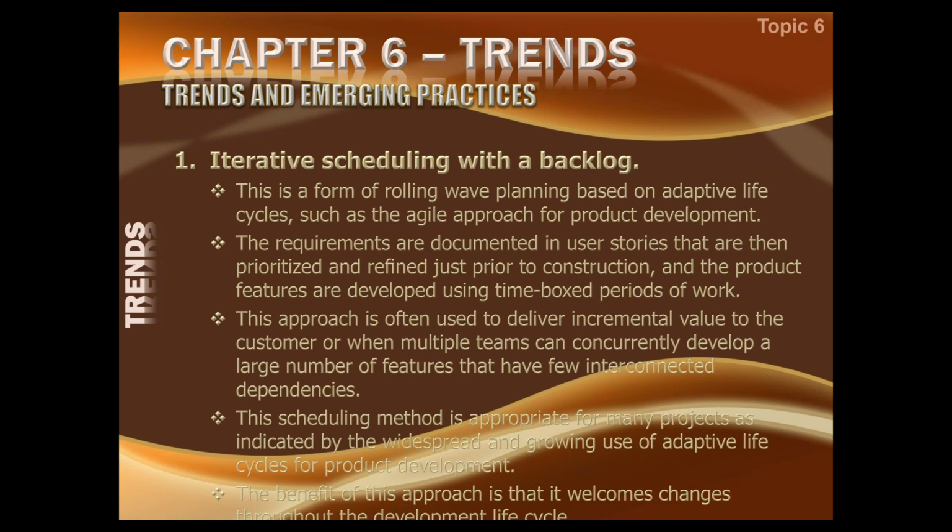We don't have phases here because phases are not time boxed. Phases are work based. We will accomplish this milestone. That is one phase. So here we are not talking about milestones. We are not fixing how much work is to be done. We are just fixing the time, and then in accordance with the time available, how much work can be done.